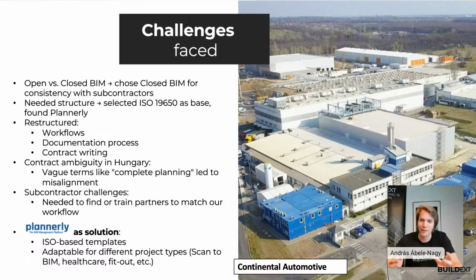The solution was using the ISO 19650 base templates, which Plannerly has. We could customize these templates because we had a large variety of project needs. We had a lot of types: scan to BIM, healthcare, sports, fit outs, and so on and so on. We really needed the flexibility and the speed of the platform. We had to be able to create these documents in like one or two days with one person alone, who was the BIM manager of the project.